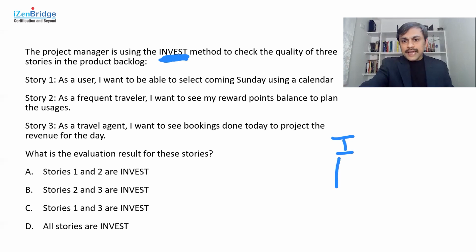N stands for negotiable, which indicates that stories may get negotiated while the execution is happening also. Some acceptance criteria may get clarified. It's never late to fix the user story, even if it is under ongoing development. We should be able to talk about it all the time. There is no bureaucracy attached to what is defined in a user story.